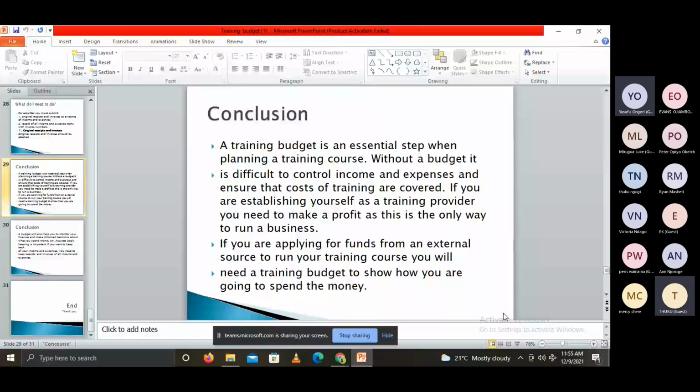When you put all those scenarios, you can attach probabilities to them. And then you are able to calculate based on all that, and get the most likely scenario. So that the price you put in the budget is one that is very likely to be the actual price